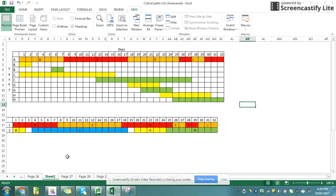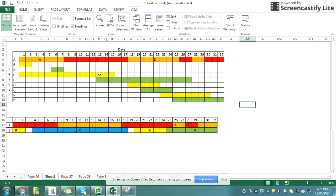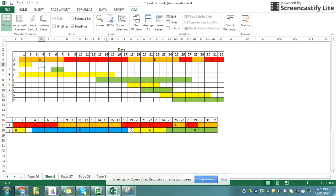Now you can see I've had a look at this in the past, and I've already worked out how I can fit those around to make them all fit into one task. So I could put task B from here straight in. I could move task C anywhere between this point and this point. So I've put it starting there and running along.